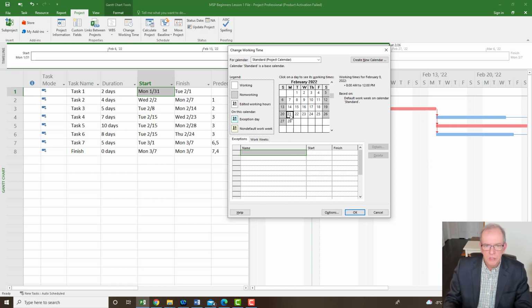It's just quicker if you just go to the 21st, put in my case, Family Day, and then all you got to do is click Start, and it'll put it at that date, and it's starting and finishing on that particular day. The next one maybe I'll put in is Good Friday. I think that is on April 15th, so I'll put Good Friday, and I'll click on that.